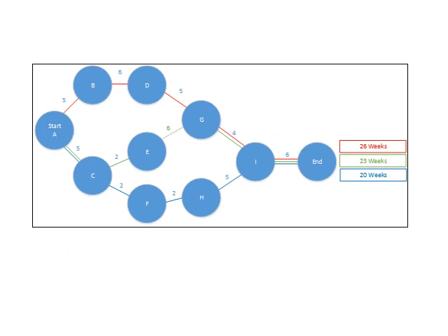Looking at the diagram, the main objective is to establish the longest path, in other words the critical path. If any of these items takes longer, the project will take longer, but for our purposes we're looking at this to establish how long the project will take under normal circumstances.